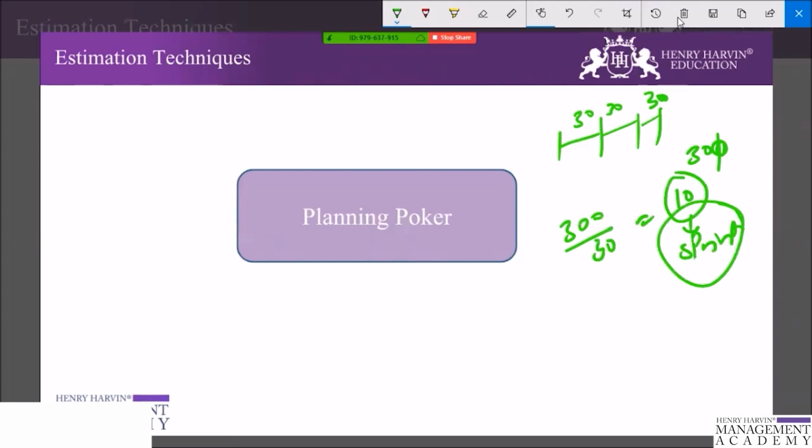So do story points relate to business value? Story points are an internal measure of the effort involved in delivering a user story. So it does not in any way reflect the amount of business value a user story provides, right? There might be a case where one story point provides a lot of business value versus 4 story points in the same system. So business value is best left for the product owner and the business stakeholders to determine. So story points do not reflect business value.